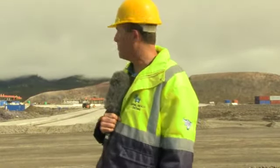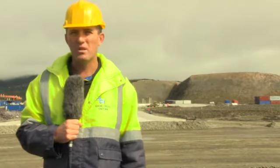The area it covers at the moment is difficult to judge. I'll have to follow up, but it's about 2.5 kilometers long and about 500 meters wide. The earthworks started in November 2012. We started off with one day shift team with excavation of the terminal building, combined building area. By the end of 2012, we had 2 teams only on day shift. At the start of the new year, we increased the day shift teams to 4 and also added a night shift. On the 8th of May 2013, we had 4 teams day shift and 4 teams night shift.